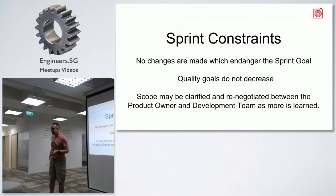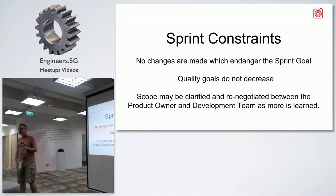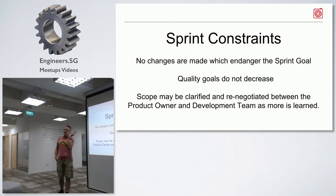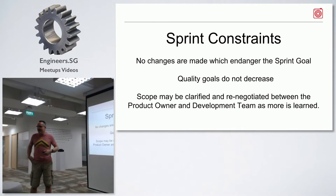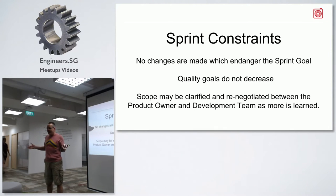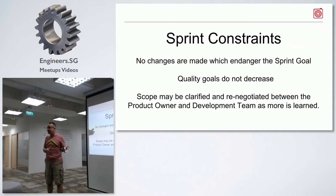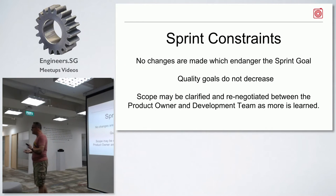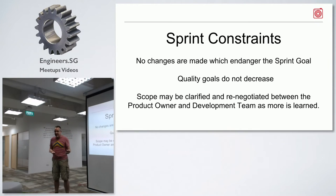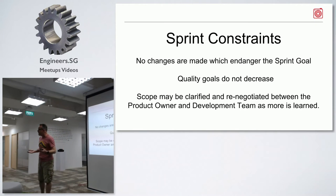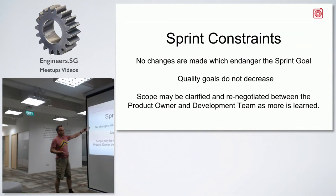Sprint constraints. There are a few constraints that you apply to any sprint that are critical for it to be successful. First: no changes are made which endanger your sprint goal. This means that when your CEO shows up having seen customers over the last week and says 'we've got to do this now,' the answer is no — we already have a goal, we're going to finish that. That's where you need a strong Scrum master who's willing to say we're not going to take that. There is a whole process for abnormally terminating a sprint, but no changes are made which endanger the sprint goal.